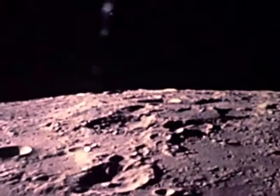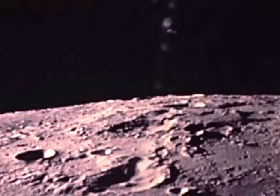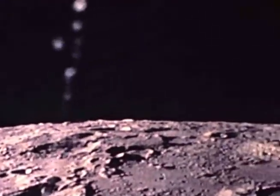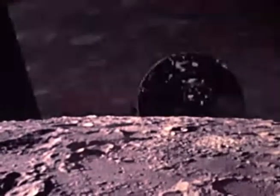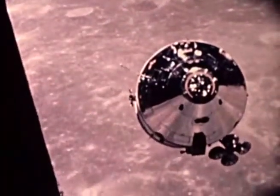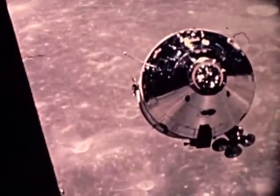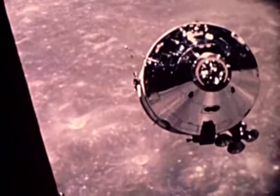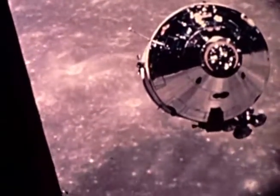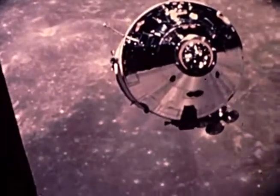At the end of the flight, inspection revealed that a vent plug that should have been drilled with several holes had in fact not been drilled. The circumstances surrounding this omission are still under investigation. Immediately after separation, it was found that the lunar module rendezvous radar was not functioning properly. The difficulty was quickly traced to the command module transponder and a malfunctioning switch. Recycling the switch solved the immediate problem, and the mission continued. The transponder switch has since been redesigned.